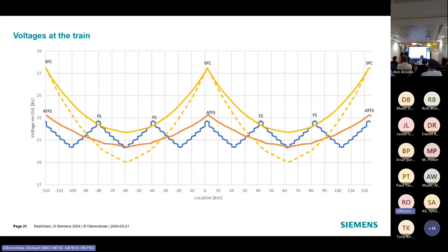And when you're operating a high output track renewals fleet, as Ben will remember and testify, every minute you lose out of that possession in a 7-hour window is yards lost of production. And ultimately, it's hundreds of thousands of pounds a week.